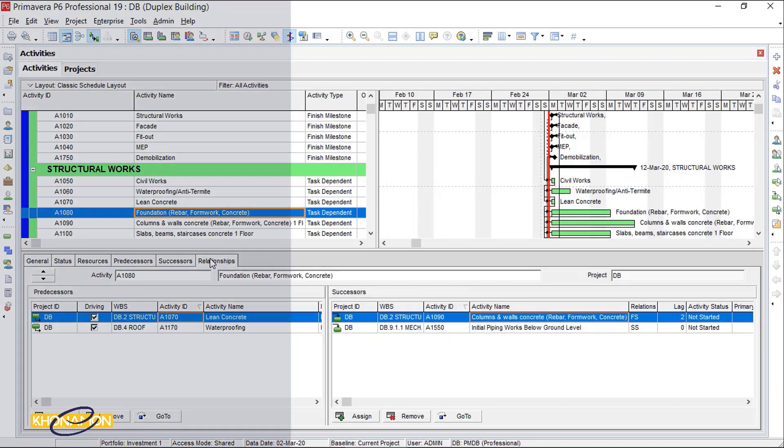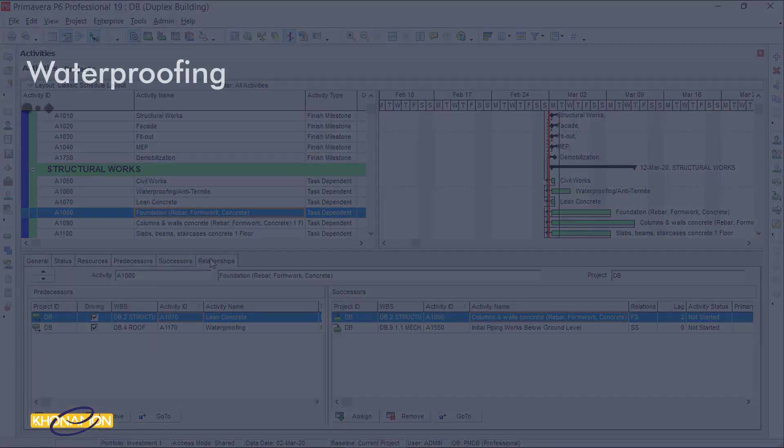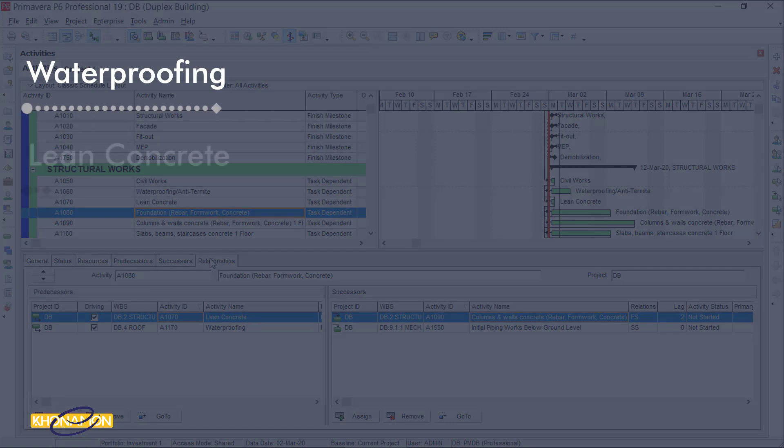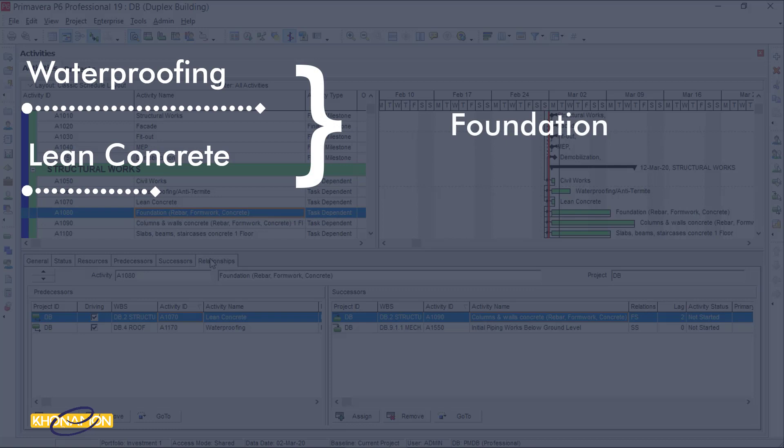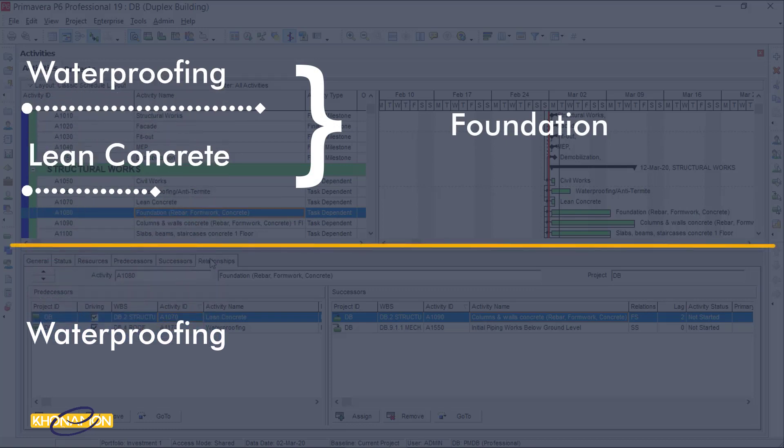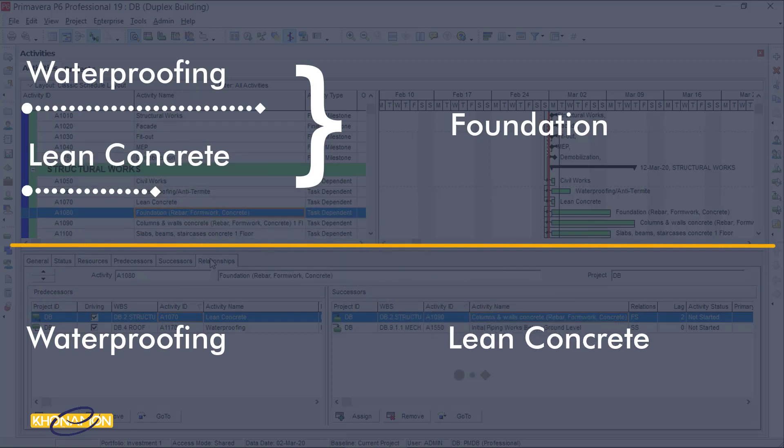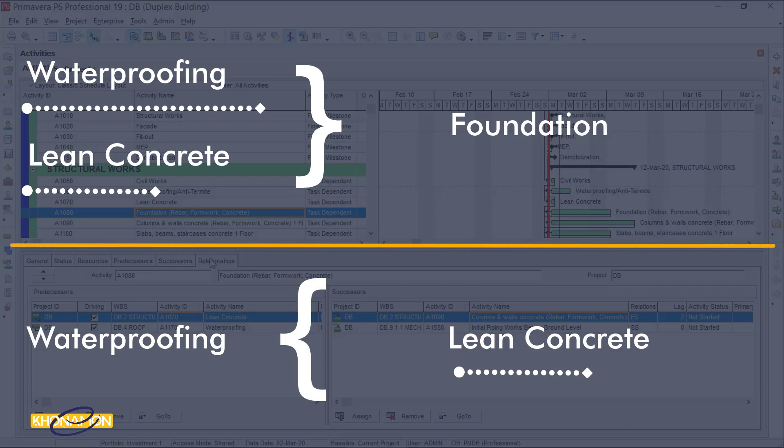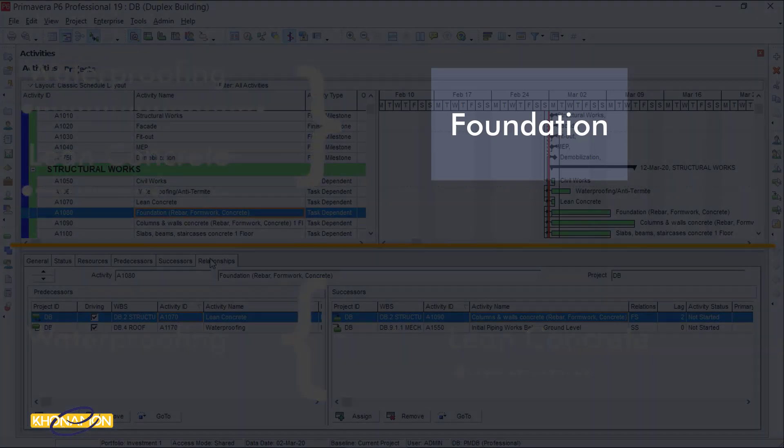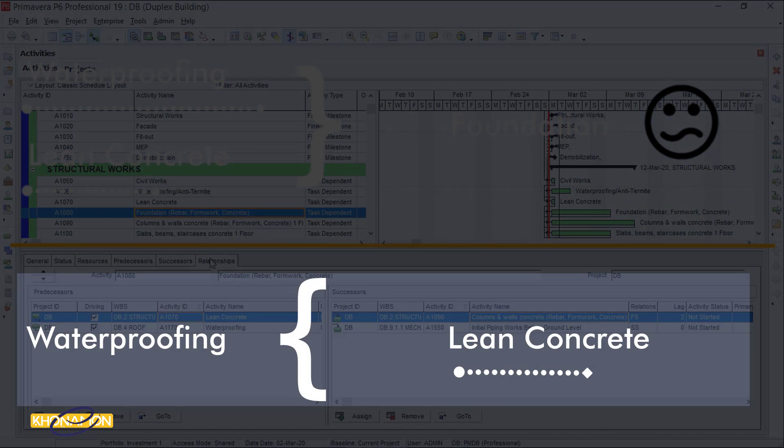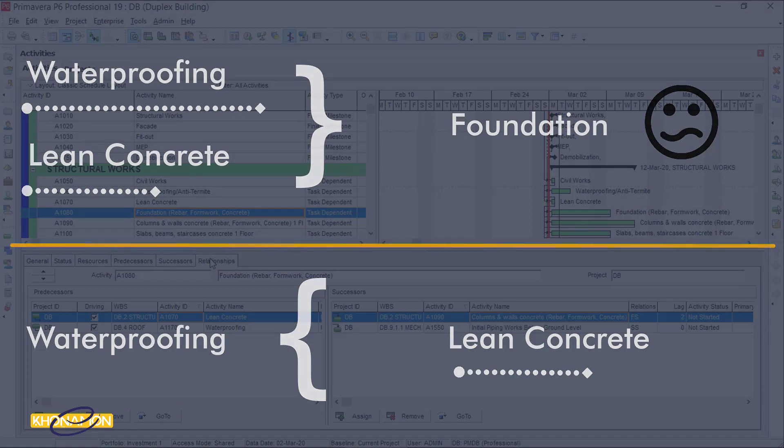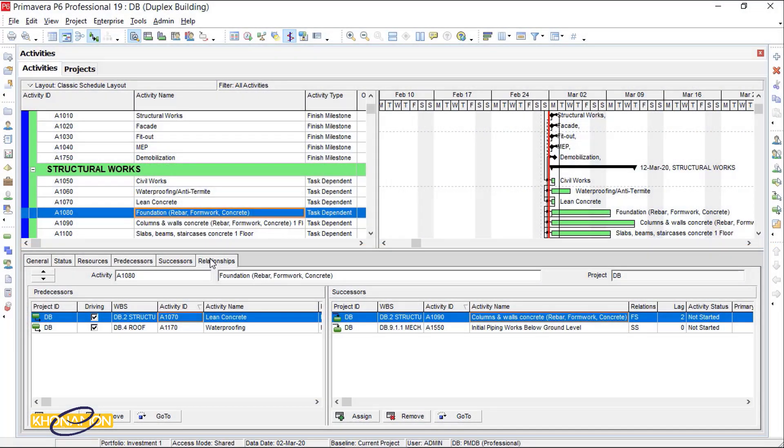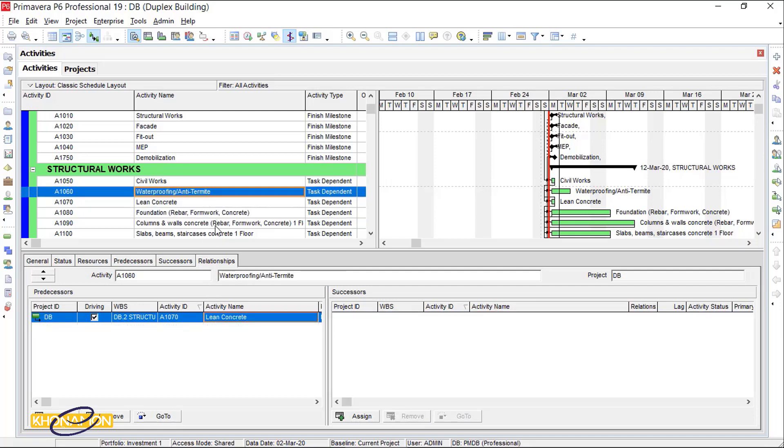The logic here is, first, waterproofing and lean concrete must finish, then foundation can start. For waterproofing, we said that first lean concrete must finish, then it can start. Foundation here is confused because two of its predecessors are linked together. This is the logic of this loop. It shows why it is wrong. Let me assign waterproofing to civil works.